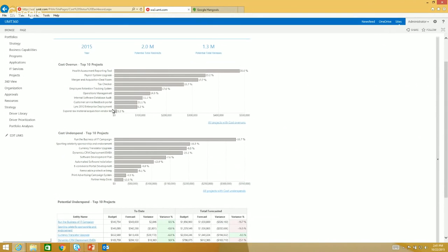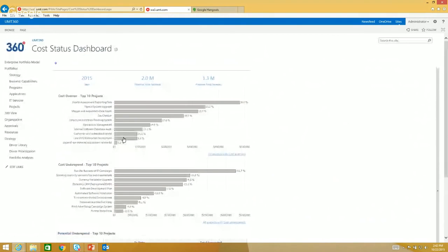So we have the cost overruns. That's the first grouping. The second is the opposite, the underspends. These are the projects with forecasts less than plan. These are the ones where we want money to be released instantaneously and then make a decision. Do we give more to these projects, or do we bring in net new projects from the pipeline?